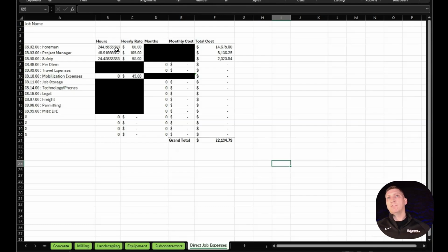We can't just bill for a foreman on site. We can't just bill for safety because there's not a specific thing that the owner is receiving for it. But we know we have to have a foreman there to lay out and to coordinate and to call in inspections and permits and go to safety meetings and all of that, subcontractor meetings, to coordinate the job. So we have 10% of all of the man hours. That estimate total is all of the man hours on the job. 10%, $60 an hour, for example, just gives you a bucket of $14,000 to pay a guy only to plan and do that kind of thing.